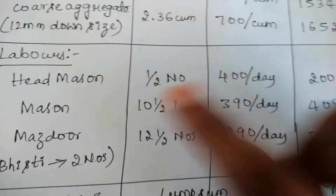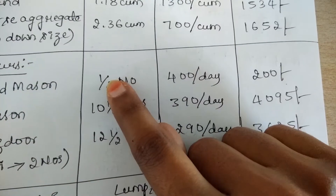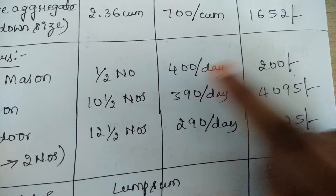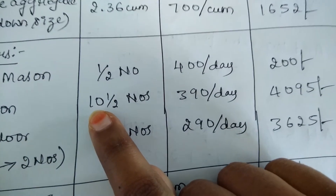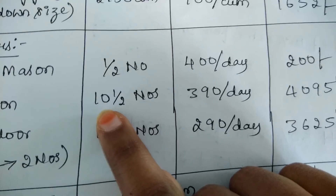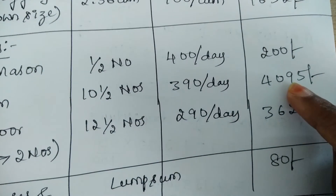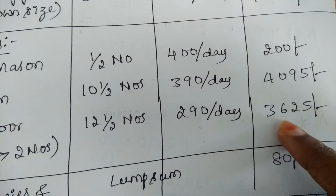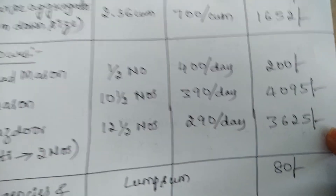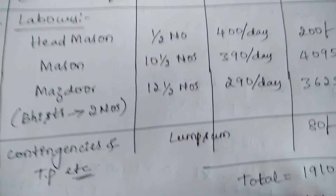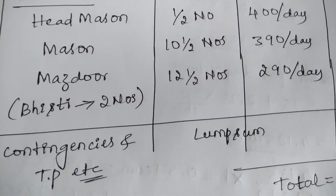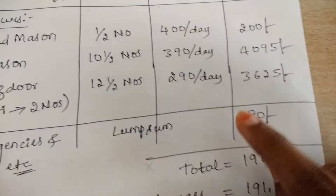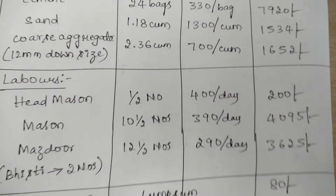Whatever rates are fixed for all types of labors are written in the table. For finding the amount, multiply quantity with rate: 0.5 × ₹400 = ₹200 for head mason; 10.5 × ₹390 = ₹4095 for mason; 12.5 × ₹290 = ₹3625 for masdur. So this gives the amount for the labors. Moving to the contingency part — for extra charges and transportation charges, we assume a lump sum amount of ₹80.